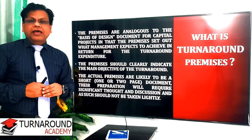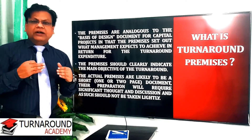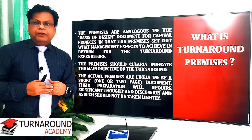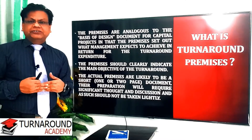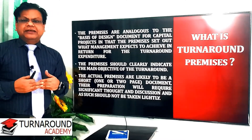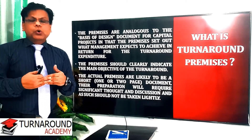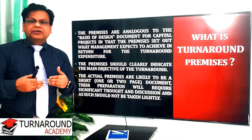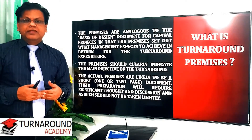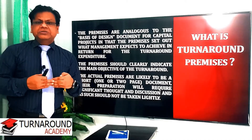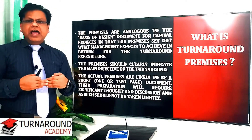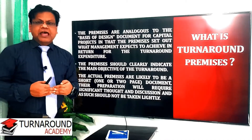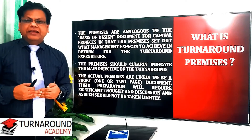Management will give you clear objectives — why they want to do the turnaround and what their expectation is. It depends on the various project basis. For example, management wants the annual production to increase from 2.3 million tons per annum LNG to 2.5 million tons per annum LNG, and they may want some design improvement to achieve this production. There will be many objectives depending on every turnaround, and these need to be defined while preparing the turnaround premises.